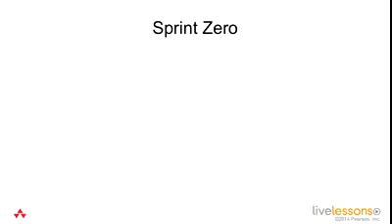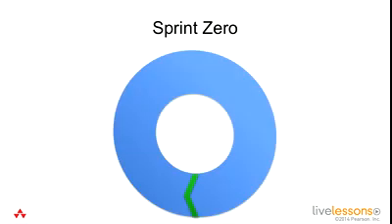So the first thing I want to talk about with getting a sprint started is a concept called a sprint zero. And in a sprint zero, it should be about the normal length of a sprint. You don't want to take all the time in the world trying to get started. You want to get started as fast as you can. But there are often a lot of things you have to do in order to get started.